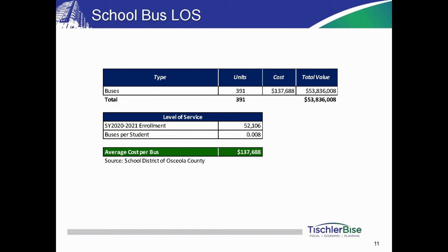$317 every time you build a school. There are different things that happen. There are contingencies that you may not have planned for in one school versus another. So you want to have a broad cross-section. One option could be we could inflate those numbers based on ENR inflation factors and see what that does. But you may also note that the Neo City Academy is on the high side, so it sort of balances it out.